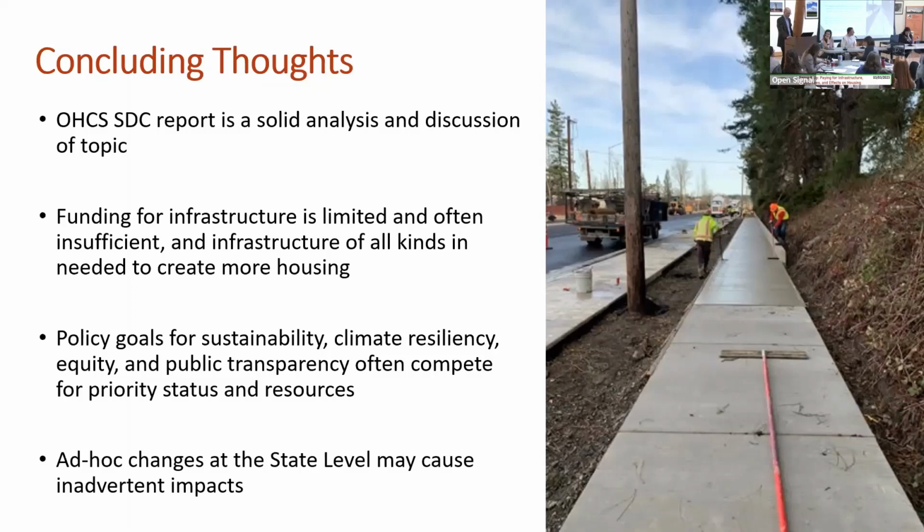So the reimbursement district works slightly differently. It allows a developer to build a piece of infrastructure that's needed in order to unlock their development potential. Let's say there's an intersection that needs to be signalized, four corners. A property owner on one corner wants to move forward, and they need to upgrade the intersection. A reimbursement district would allow the cost to be distributed among all four corners.